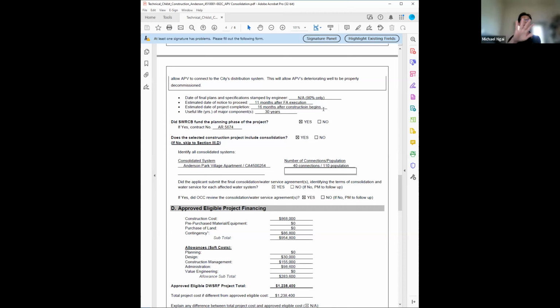But otherwise, any other dates, such as construction begins, when you submit your bid application, or submit any other little documents here and there, those are estimates. We can work on it if you need to change it. But again, the two that we cannot change easily are the project final completion date and the final disbursement date. Okay.